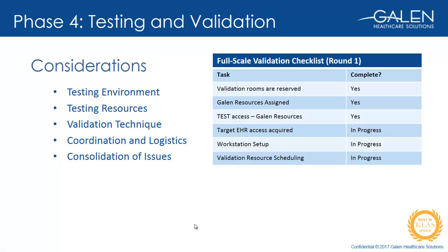So along with the resources needed to configure the testing environment, the client is also going to need to schedule resources to do the actual validation, and the sooner these folks can be identified, the better. We suggest, especially with larger full-scale testing, that end users, or at least clinical users, be included in the validation. Overall, it's just important, once again, to include people who are familiar with the data and also workflows in the target system. It can be very complicated. Sometimes designating a testing coordinator on top of the clinical analyst assistance there to coordinate the testing phase of the migration can be very helpful.